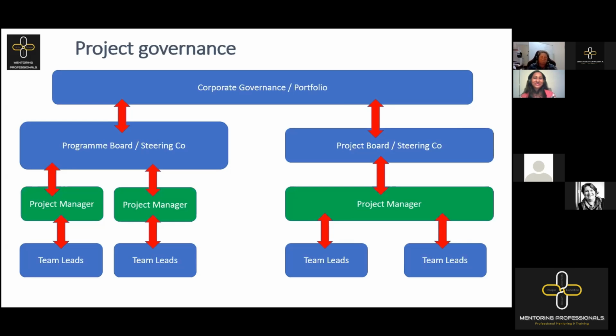Exactly. Yeah, honest. Well, of course, if you're working in an agile environment, that would be perfectly true. So Prince 2 has 6 tolerances: time, cost, quality. They actually sit across both your Prince 2 as well as your agile. But in terms of agile, those things don't move. In Prince 2, we have tolerances around those. We also have benefits, which have tolerances. We have scope that has tolerances, i.e. how much are we likely to expand in terms of our scope creep before we say that actually something is wrong.